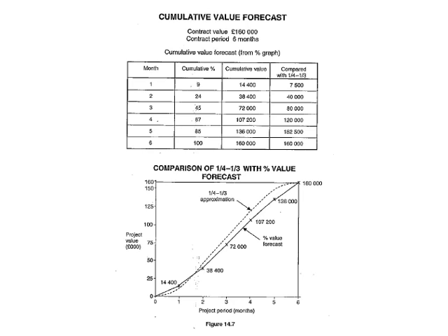On a 6-month project, you estimate that you will spend 9% within the first month, 24%, so it is 15% on top of the 9, so this is cumulative. And then you go to 45%, then 67, and then 85 up to 100. So very easy.